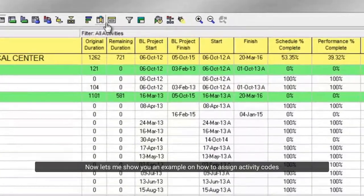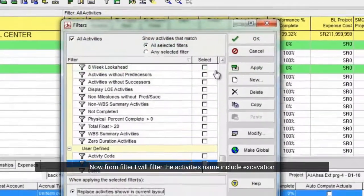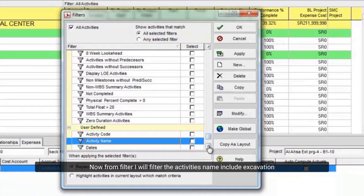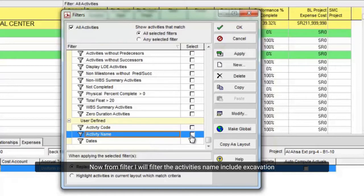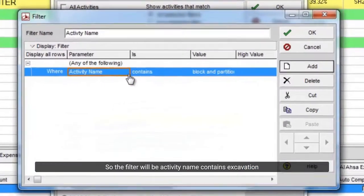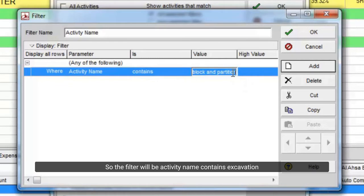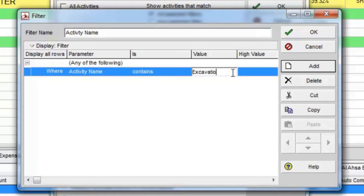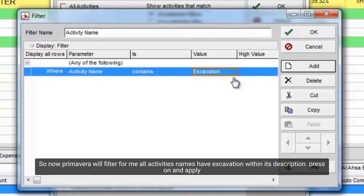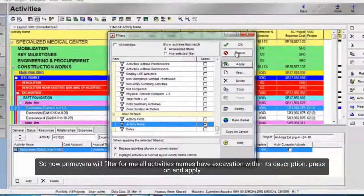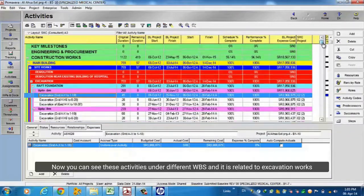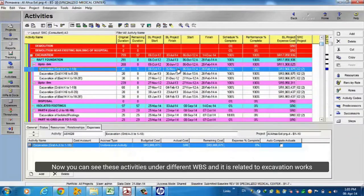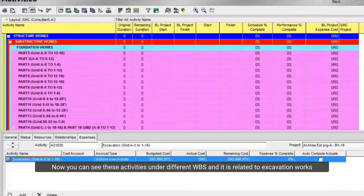Now let me show you an example on how to assign activity codes. Now from filter I will filter the activities name that include excavation. So, the filter will be activity name contains excavation. So now Primavera will filter for me all activities names that have excavation within its description. Press apply.